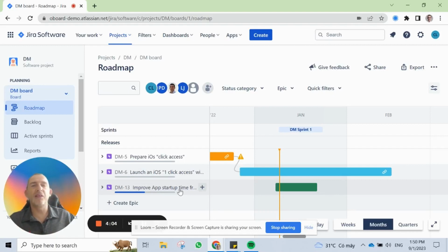So if you are dealing with sprints, you can plan 5 or 6 two-week sprints within a quarter and see what you are incrementally improving. So you can incorporate your sprint planning here in Jira, but to have the overall result on a quarterly basis, you need OKRs for that.